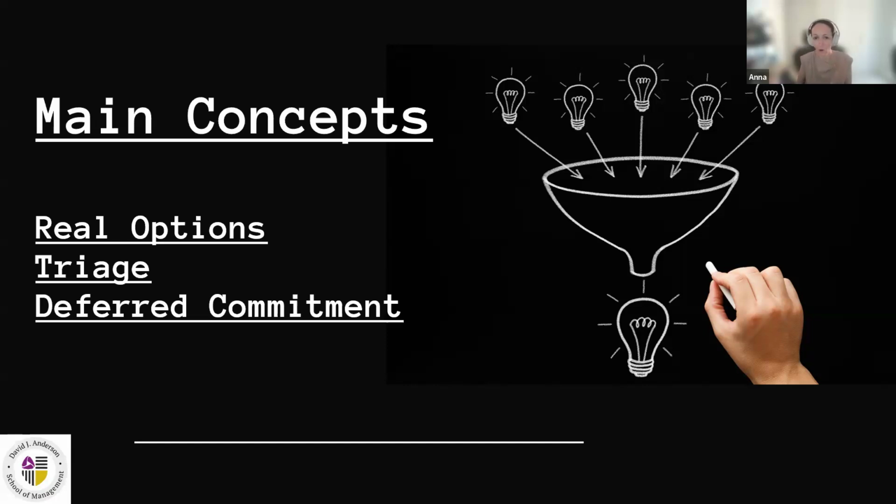Because committing to work too early very often means that we start working on something that we don't really know, when our uncertainty is still very high. And quite often, if we committed too early, we may realize during the delivery process that we don't really know what it is or why we need it. It may result in changing decisions, in changing minds of clients, or of us, or for example the scope of work expanding because we realize that we actually need much more to be delivered than we initially thought.